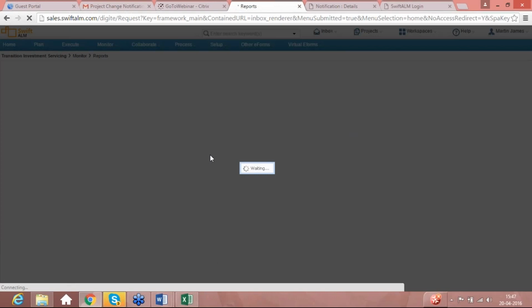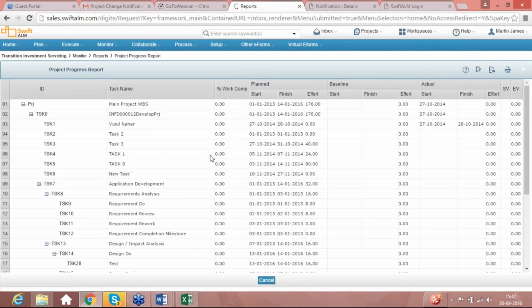This project progress report is of high importance, because it gives you the entire WBS that you would have generated for your project in terms of the percentage completion, and it also talks about the schedule variance and effort variance at each task level.